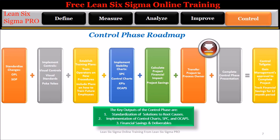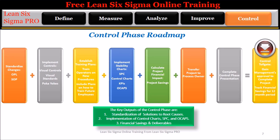Step 7: Complete the control phase presentation. Step 8: Control tollgate — gain management's approval to complete the project. The project leader along with the process owner are responsible for tracking the financials from this project for the next 12 months. The key outputs of the control phase are: 1. Standardization of solutions to root causes, 2. Implementation of control charts, SPC, and OCAPs, and 3. Financial savings and project deliverables.